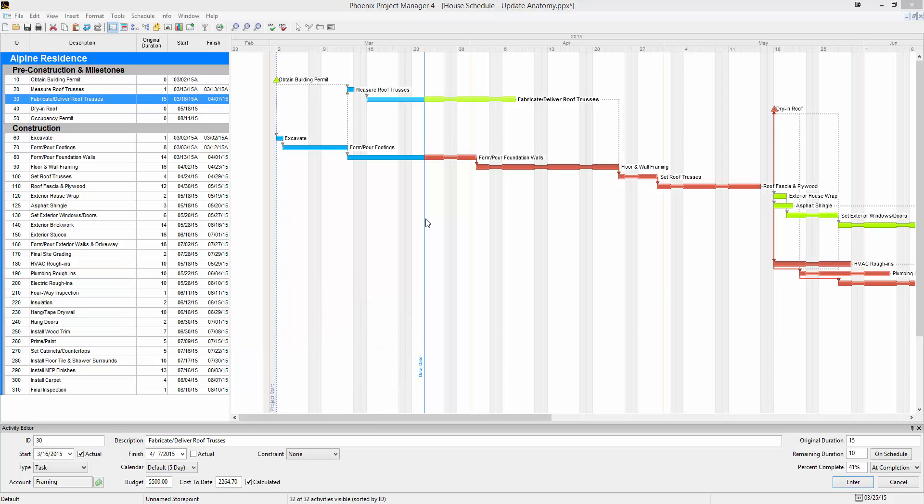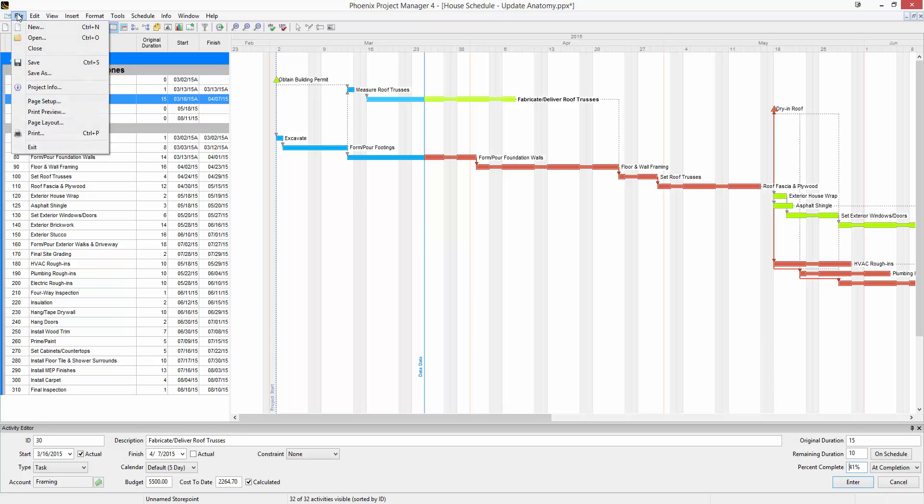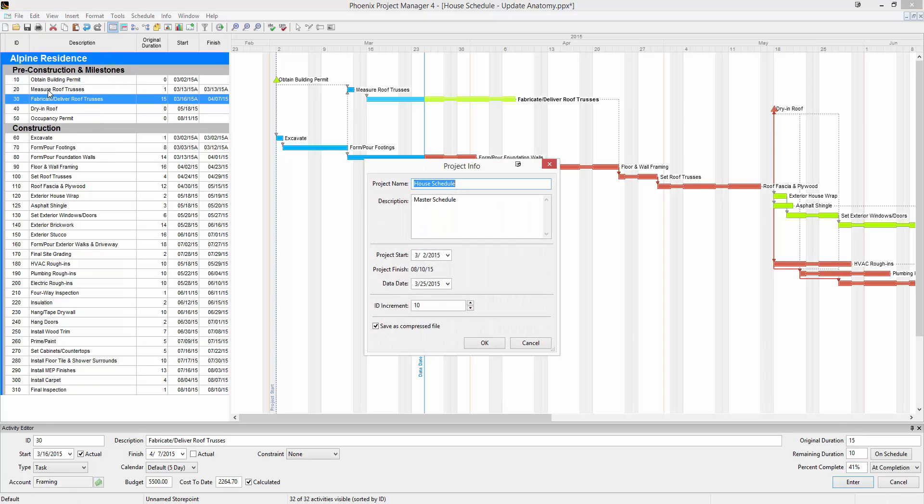If you're updating the schedule on March 25th, the data date should be March 25th. If you're ever wondering what your data date is, you can go up to File and then Project Info. In this window, you'll find your data date listed.